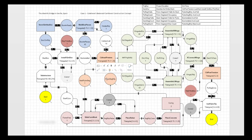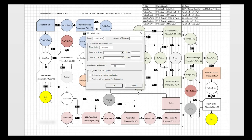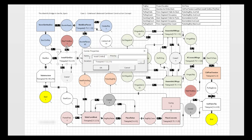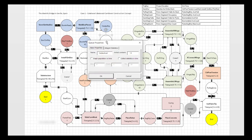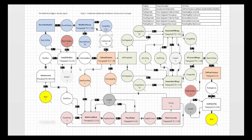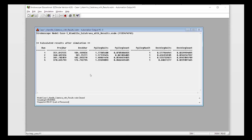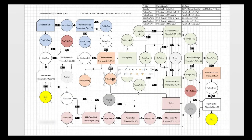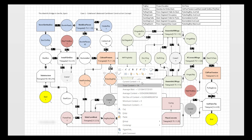This is the live model for Case 1 in Easy Strobe. To edit the global parameters, we can right-click anywhere on the page to select the seed, time limit, and number of replications. We can double-click an activity to enter its name and the distribution for its duration. Similarly, we can double-click a queue to enter its name and initial resource contents. To run the simulation, we right-click anywhere on the page and select Run Simulation. This brings up the Stroboscope simulation system that runs 100 replications and produces statistics for each result defined in the model.